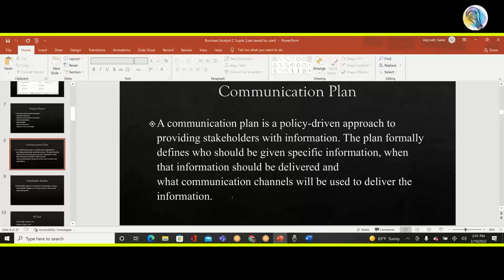A better way to get an approval would be an email. So after 6 months, when they come back and say this is not what we want, if they emailed it to you, you could attach that email where they mentioned, we are approving this BRD. You could send it to them and say, this is what you approved. Why are you able to do it? Because you have the email on file that they sent.